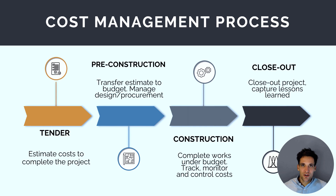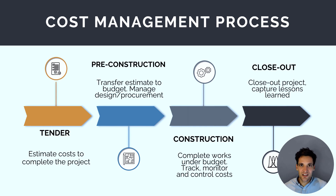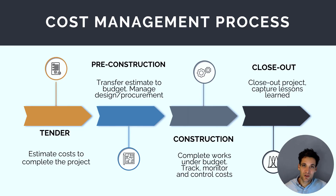We map out the construction cost management process across the stages and life cycle of a construction project. We start with the tender phase where we estimate the cost to complete a project so we can secure work from a client. We then move into the pre-construction phase where we take this estimate and transfer it into a budget, and manage any design and procurement activities to ensure we achieve our budget. We then start construction and manage the works, monitoring and controlling costs so we're doing the work for less than what we originally estimated. When we finish, we close out all cost control activities and capture lessons learned to feed back into the process and improve our construction estimating function.